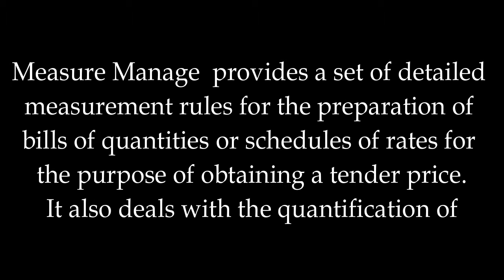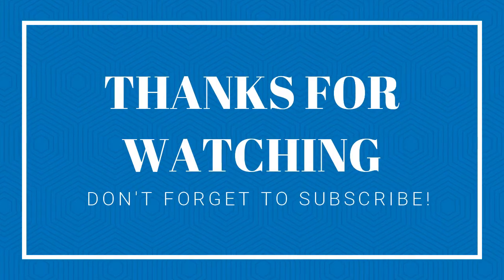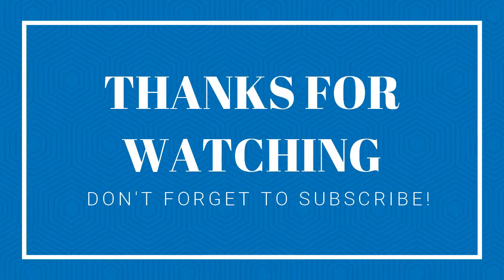NRM 2 provides a set of detailed measurement rules for the preparation of bills of quantities or schedules of rates for the purpose of obtaining a tender price. It also deals with the quantification of non-measurable work items, contractor-designed works and risks. Guidance is also provided on the content, structure and format of bills of quantities, as well as the benefits and uses of bills of quantities.